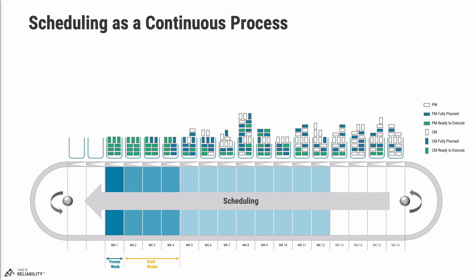Once done, the conveyor belt shows all white blocks moved to future weeks, with a number of fully-planned blue blocks kept in weeks 3 and 4 because they are high-priority work best combined with other work already scheduled in those weeks. The following week, the scheduler will take another view, and if the planner has not converted those fully-planned work orders to ready-to-execute, they will simply be rescheduled to future weeks and some other ready-to-execute work brought forward.